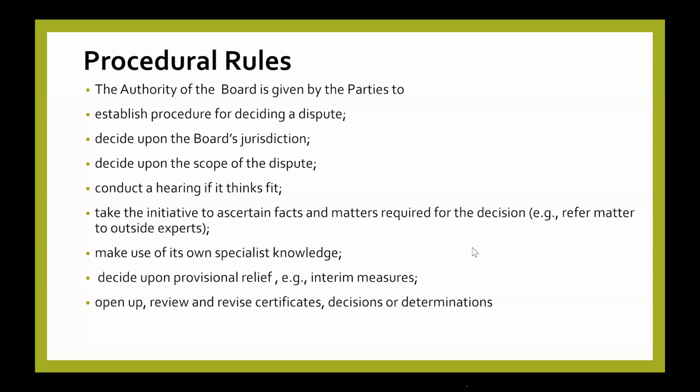Okay, so you submit your referral, because the referral will have gone. So the answering party, you submit it within 7 or 10 days. The other party, you submit a reply within another set of days. And so would there be a hearing? This is how we'll conduct the hearing. Okay, our decision at the end of the hearing will be issued within this length of time, maybe another 10 days. So you give a program sort of as to how things will be done.